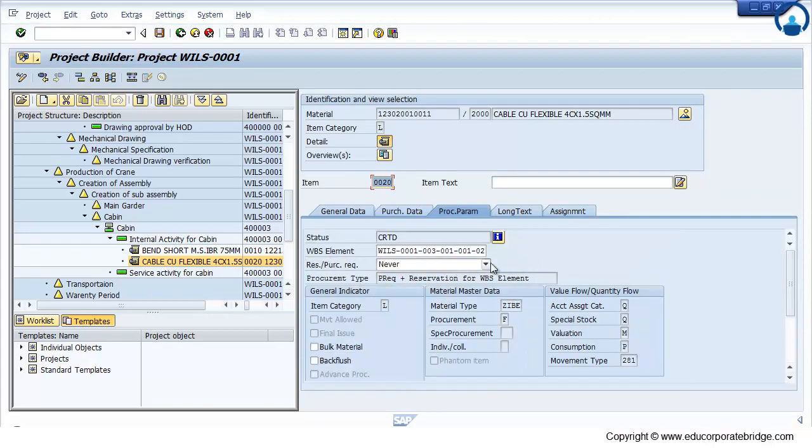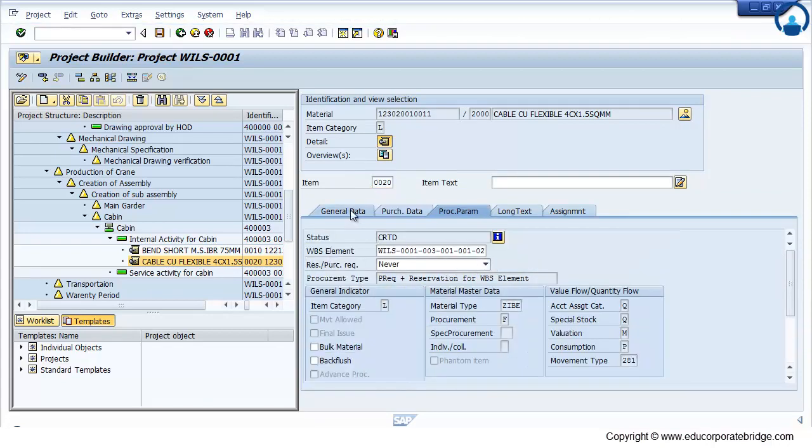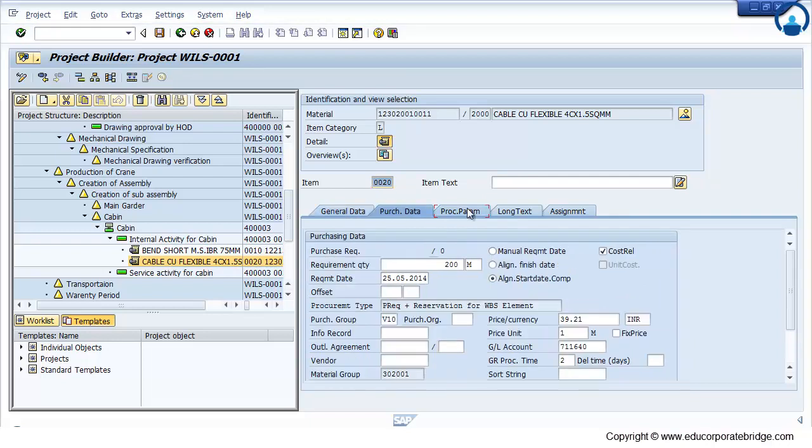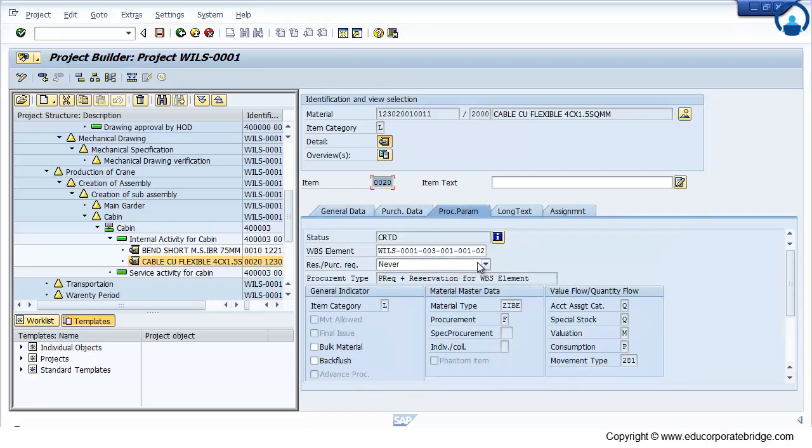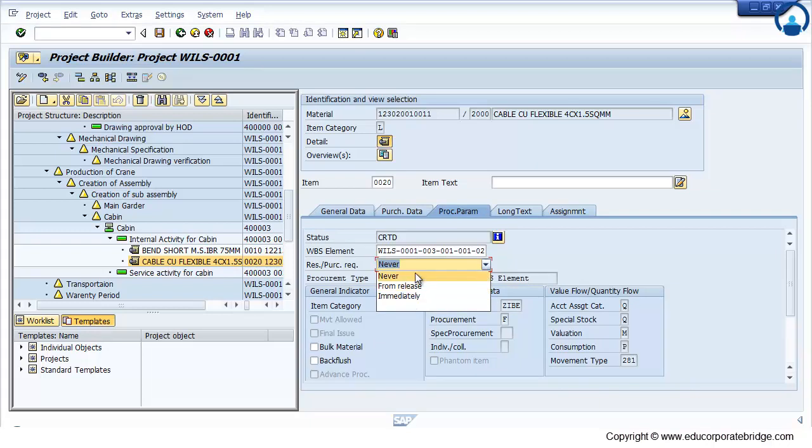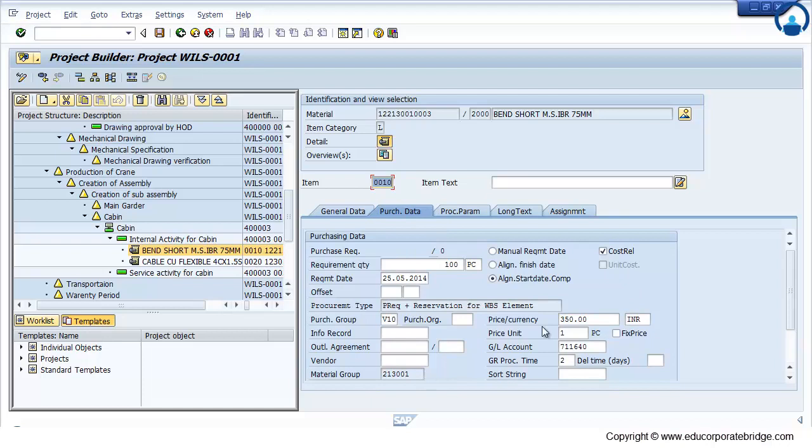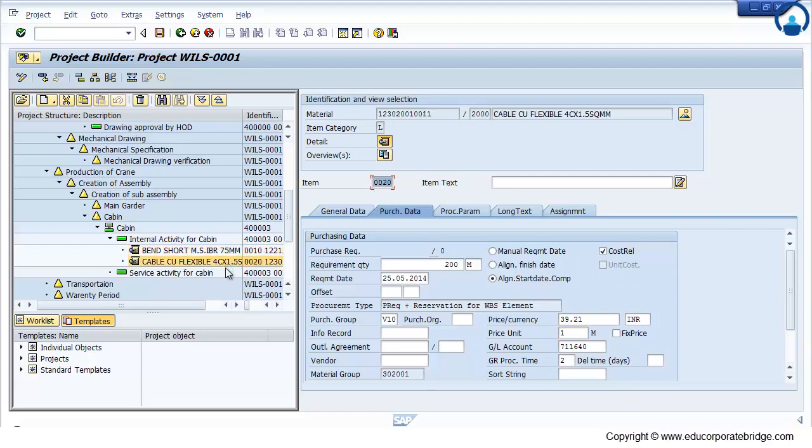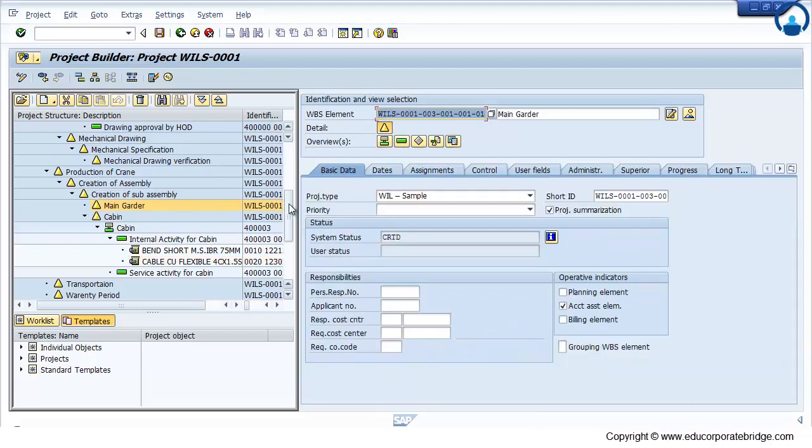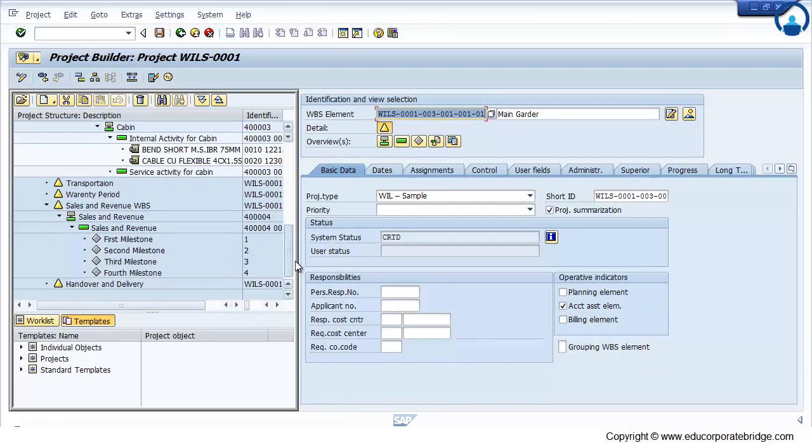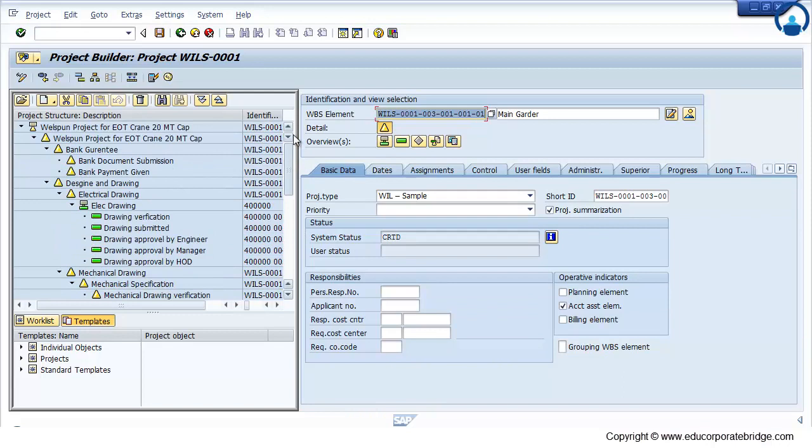So material will get attached. Right now it is showing the status that we need to create a purchase requisition. Later on system will automatically create a purchase requisition, that we will see later. So material I have attached here. The quantity I put there. The GL account, price I have picked up from the material master.